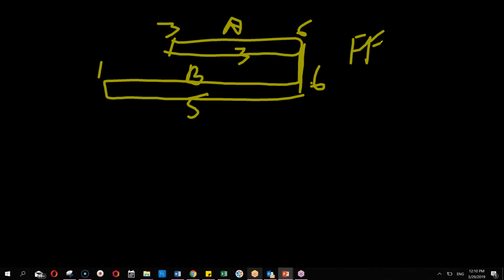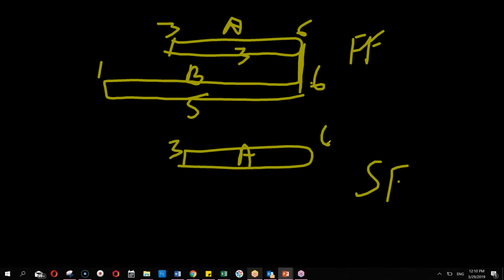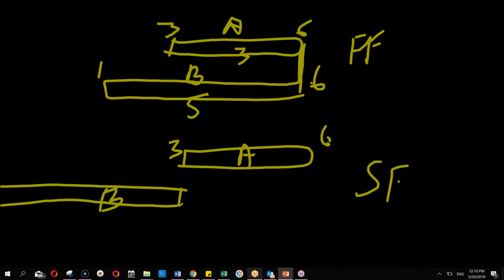And let us do the impossible. This is a start to finish relationship. This is my A, starting on 3, finishing on 6. And the finish is connected here. You understand? This is the connection. This is start to finish. So B must finish on 3. That means the start goes even backwards. So it is maybe 27 or 28 of December, something like that.